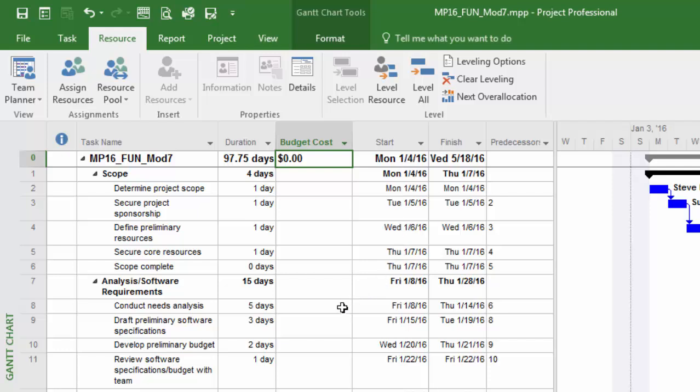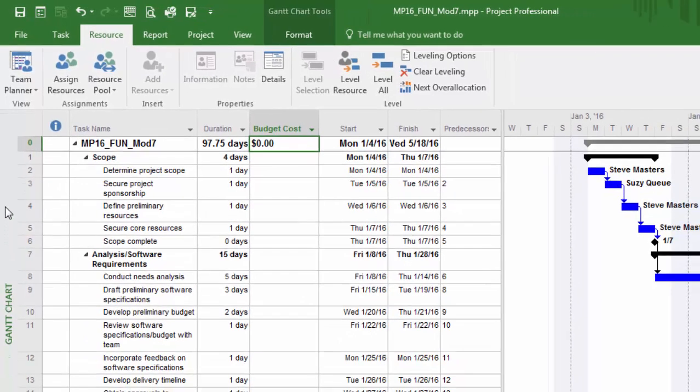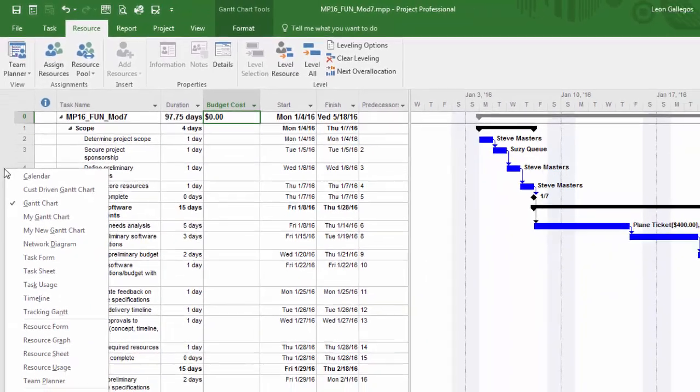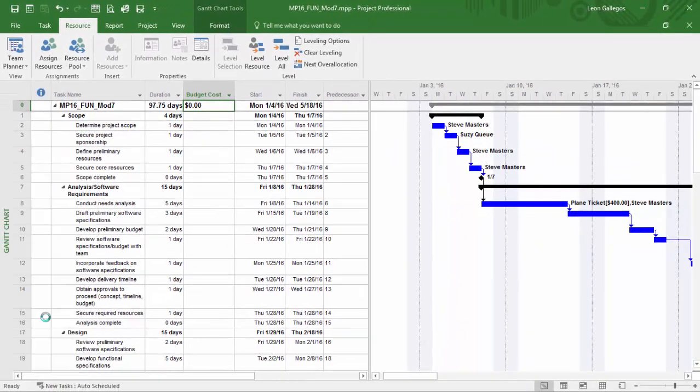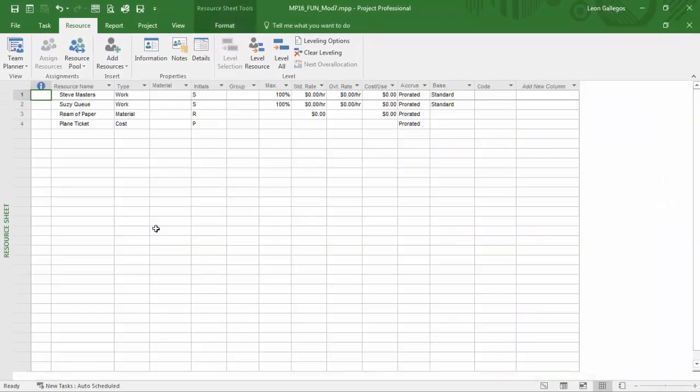What we need to do is create a resource with that budget designation. I'll right-click in my view bar area, go down to the resource sheet, and we're going to create a new resource here.